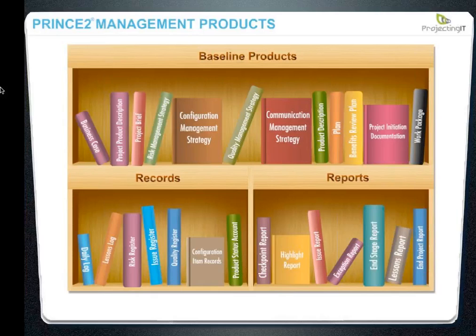And then we have the end project report, which is the project closure report, to help the board understand how the project work was completed and also evaluate the performance of the project management team. So these are all 26 templates altogether, not necessarily to be seen as project documents. It depends upon your project environment, like I said before. But these are used as information by project stakeholders to see how the project is being done. Whether you keep them as physical documents or whether you use them as a set of information will depend upon your project.